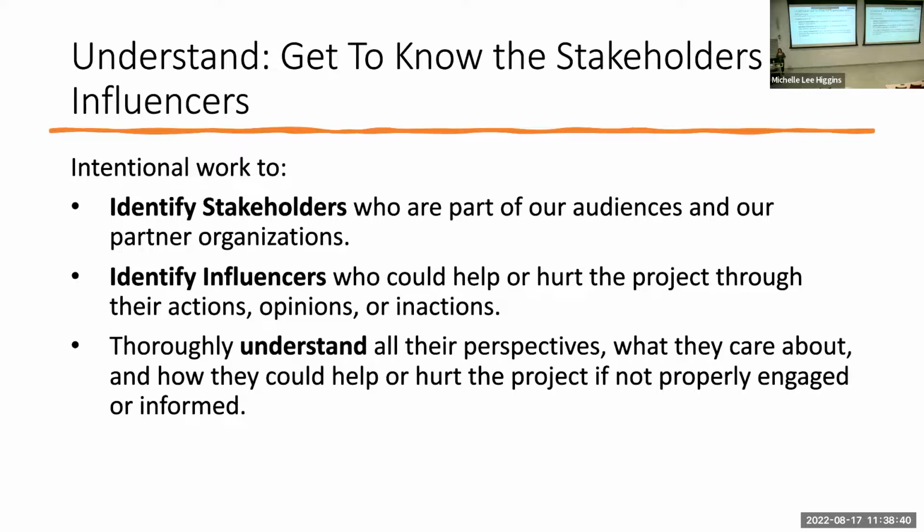And it takes intentional work to identify your stakeholders. I had a team that was looking at diseases that dogs carried, and they had some stray dogs in the community. And one of the stakeholders they realized was one of the women in this community who often put out water and food. This person had sort of a relationship with the dogs and thought, this person, we need to have their perspectives. This is a stakeholder. This is also an influencer for our project.